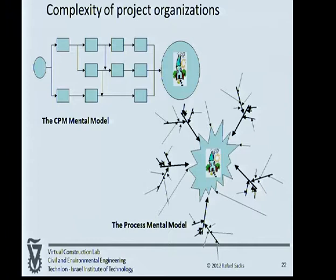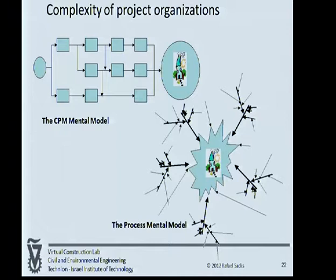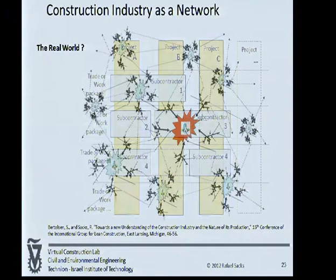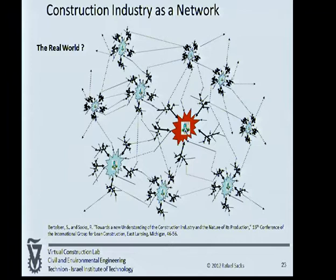The real world looks more like this: there are all these supply chains feeding into the project, most happening off site — preparing, designing, fabricating, doing various analyses — and eventually all applying their labor to the project where it's actually being built. But each of those subcontractors is probably working on more than one project at a time, juggling their labor between all those projects. So the real world actually has all these different projects competing for the same resources. They're sharing resources, but sometimes that sharing is not so friendly, and so we end up with subcontractor behavior that begins to help us understand why projects have become so much longer in time.